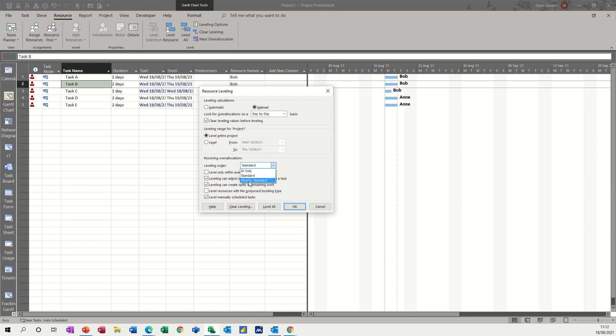And this option at the bottom is any priority that's been set to a task first. So I might have a priority for task B, for example, of 400. So it would move task A before it would move task B. In fact, that's the wrong way around. If I put that to 600, it would move task A before task B on that example.